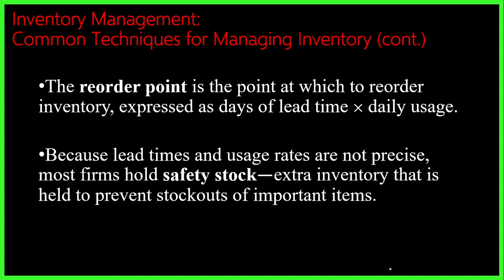Okay, the reorder point is the point at which to reorder an inventory. This is normally expressed as days of lead time times daily usage. Let's try to discuss that. Your days of lead time is actually from the date of order up to the time the inventory will arrive, no?